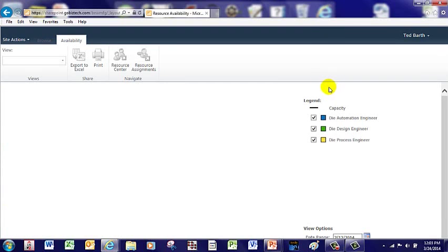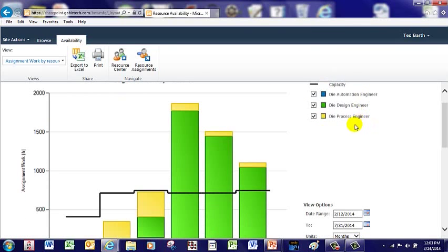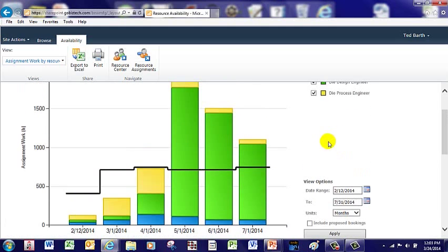And what we're going to do, we're clicking on this, and this is going to show bars which represent the resource demand hours of the schedule. So these are the resource hours required to make and meet the schedule, and the line chart shows the resource capacity of these 3 resources. And so let's say the resource manager can look at this and see what his future load is. You'll see that we've chosen a half a month of February, so the hours are almost half, and of course the hours vary by the number of days in the month without the holidays calculated in.